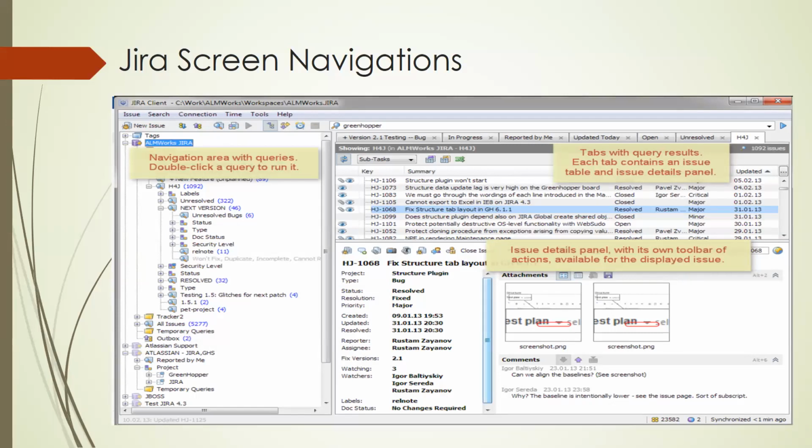Additionally or parallelly, we also have to check if the developer has created any new issue out of it. If there is any new issue which they are not able to understand, we have to address it. Sometimes they also define issues which are obstructing them from working. We call it an impediment. You remember the word impediment? Yes.